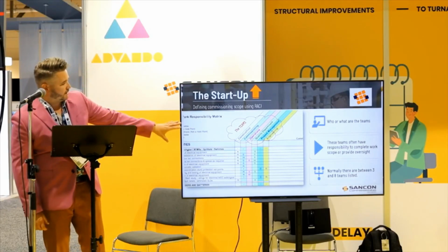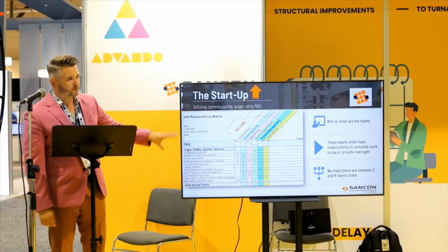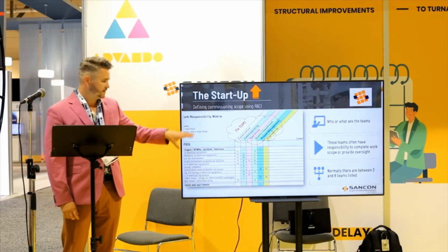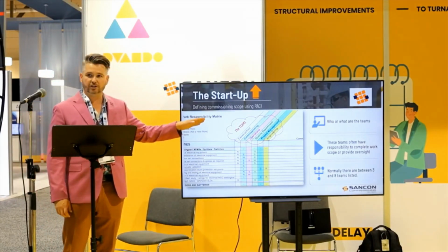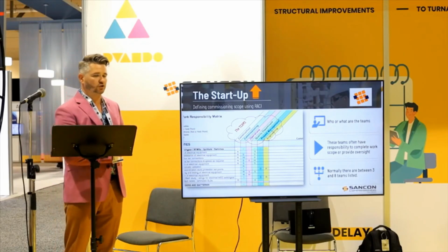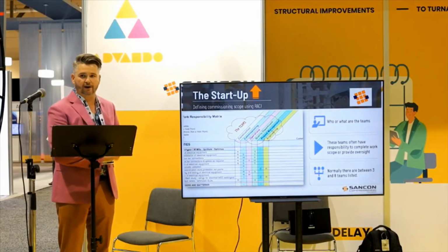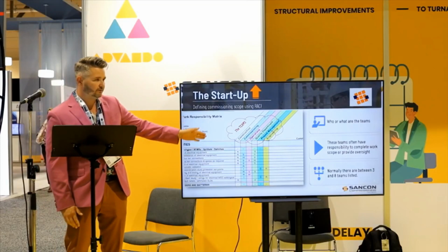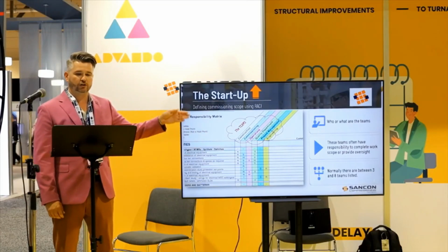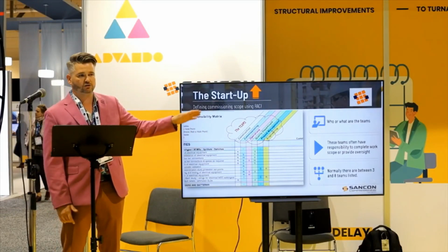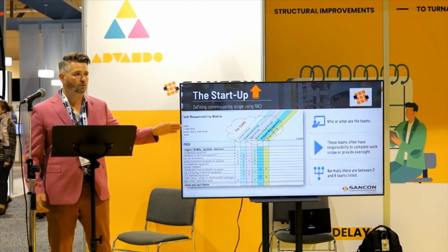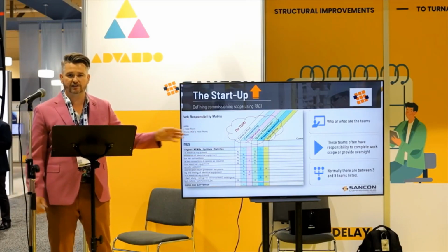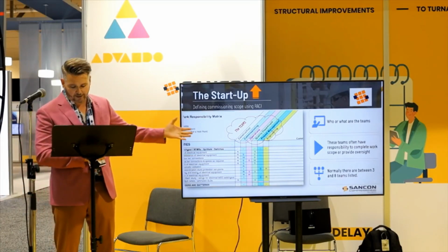Next piece we want to identify is the teams, and let's talk about the teams a little bit more. This is, again, editable. You can add as much detail to the teams as you want. We might have multiple construction contractors per area within a project. So when we have different areas of a project and we have different construction contractors, let's identify those construction contractors so that we know who's responsible for which areas of the facilities, which vendors might be required as part of the teams.